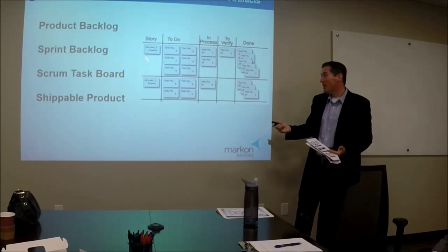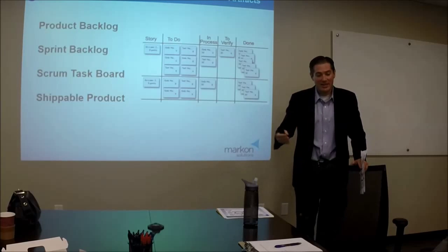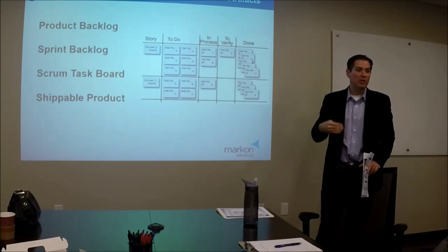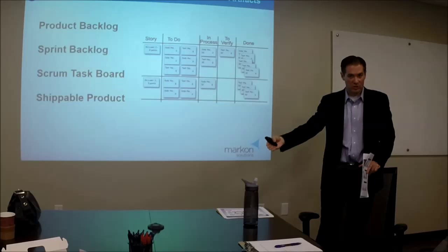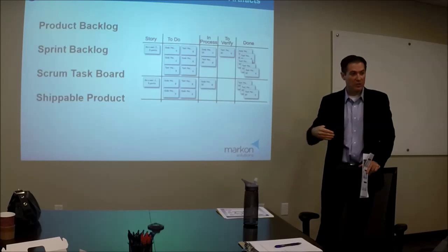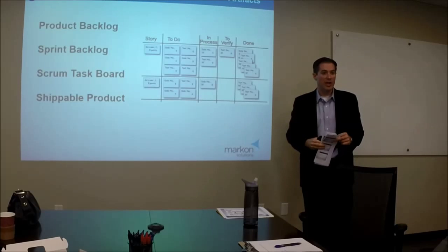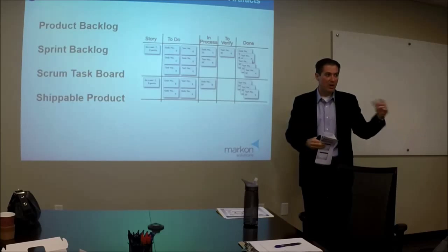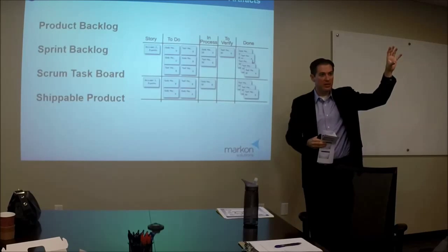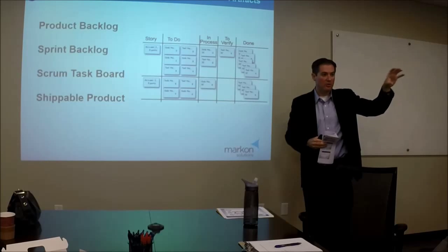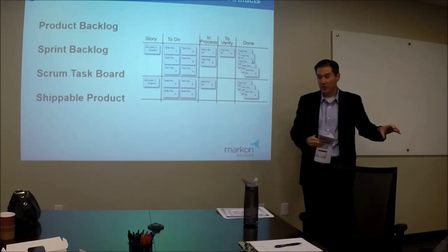So you break it down to a user story. You've decided as a team that a story should not take longer than your length of sprint. So if your sprint is a 4-week sprint, you shouldn't come up with a story where you say, well, that takes 6 weeks to get done. All epics need to be broken down into stories. All stories need to fit the sprint. If they don't fit the sprint, they're really an epic, and they need to be broken down further into stories.